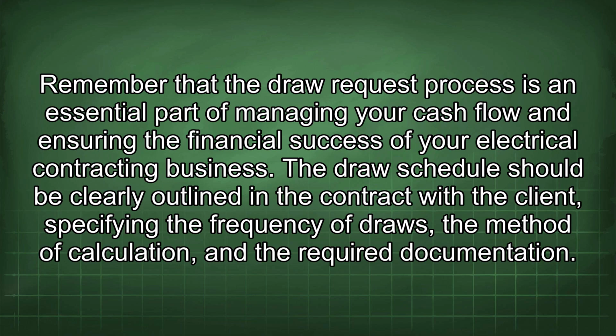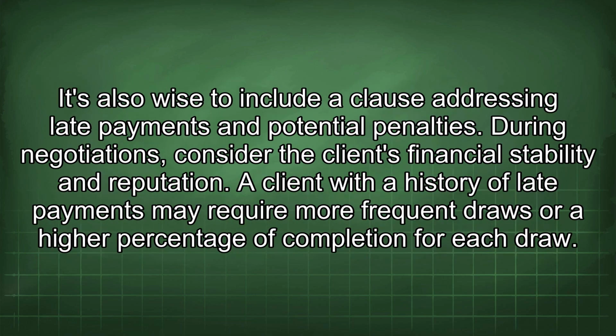The draw schedule should be clearly outlined in the contract with the client, specifying the frequency of draws, the method of calculation, and the required documentation. It's also wise to include a clause addressing late payments and potential penalties.